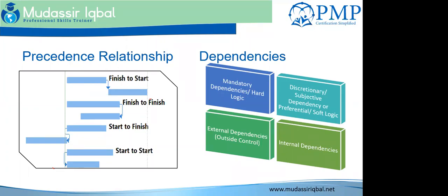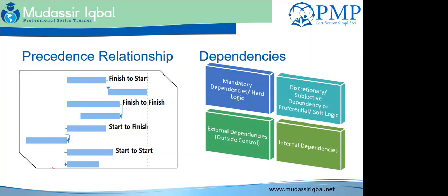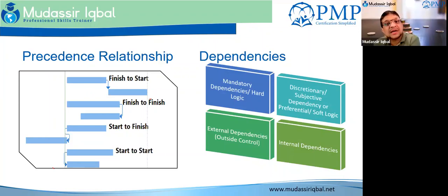Well, you'll spend a ton of money cleaning your carpet because it's going to get paint all over. Maybe, and then you have to do risk mitigation, some plastic covering, making sure that the paint does not fall, and you need to make sure that the people working on it are very, very careful. So that is a subjective relationship. That is the best practice. But tomorrow, if you are losing time and need to gain time, you could say, okay, fine, let's begin it together. You can break that relationship.